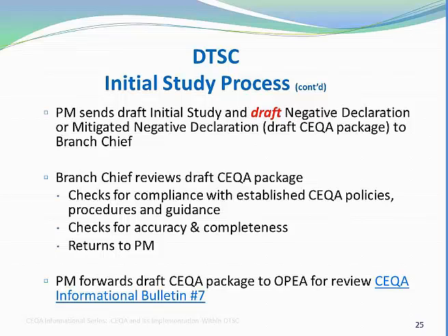Our staff reviews the draft CEQA package for compliance with CEQA, the CEQA guidelines, and DTSC guidance. Our staff will also verify the analysis and findings with the CEQA package and whether or not the public notice schedule is workable, and notify the project manager that the CEQA package is either approved for the public notice phase of the process or that revisions are needed.